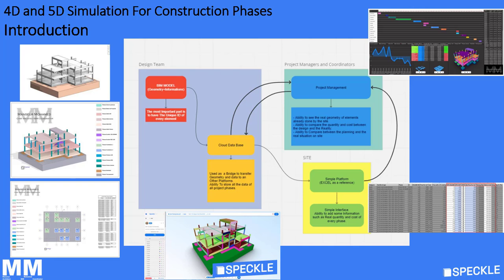The site team plays a vital role in implementing the project according to the established plan. They are responsible for meticulous task management and supervision of all on-site activities. Additionally, they must use the quantities and cost associated with each element to facilitate procurement, ensuring accurate tracking of real cost and quantities used during the project's execution.